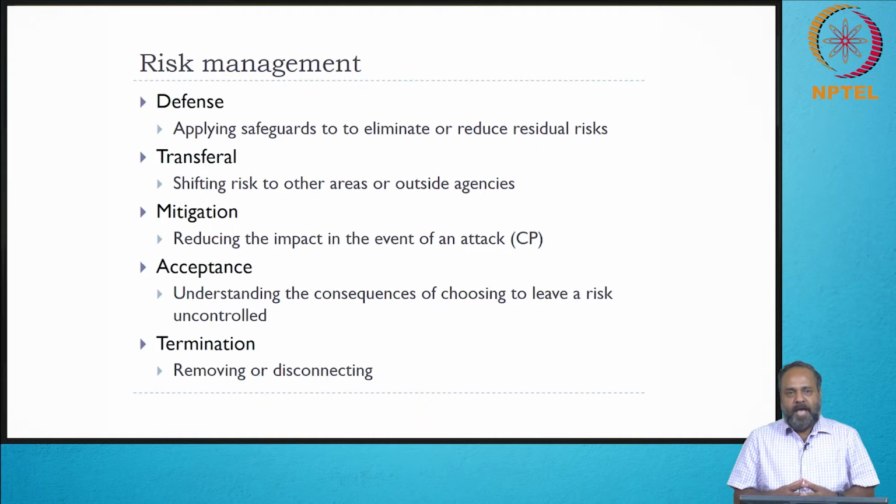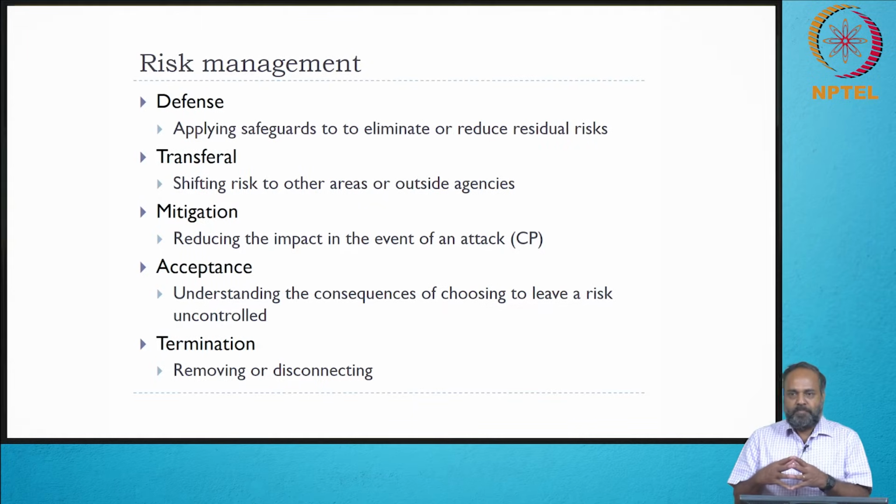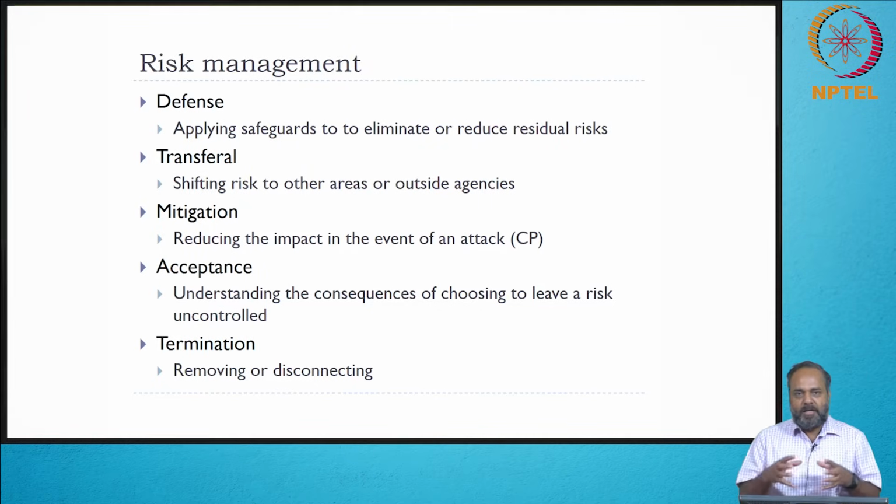So we finally discussed two important measures that are used in assessing risk: loss frequency and loss magnitude. Loss frequency is the product of the probability of an attack and the probability of a successful attack. Success in the sense of it actually happening in your system. Loss magnitude is the exposure of an asset: the asset value multiplied by what percentage of that asset will be exposed. These are measures that one needs to have, and once they are developed,